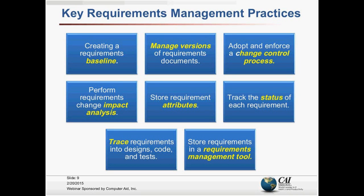Here are the key requirements management practices as I see them. The principal goals are to agree on a set of requirements that can be used as a foundation for the development work that follows, and to ensure that those requirements are accurately implemented in the product. The first thing we do is establish a requirement baseline — a set of agreed-upon requirements for either the next portion of the work, whether it's 100% or just a few percent of the ultimate product.